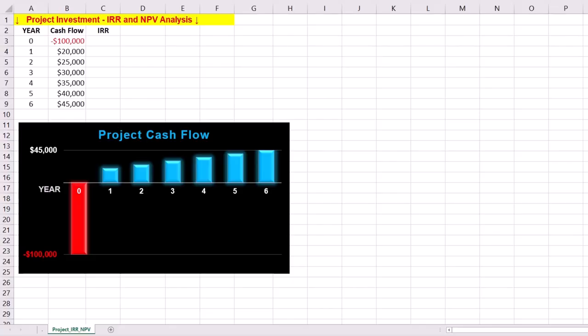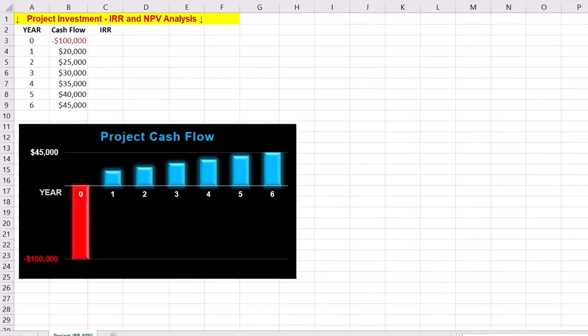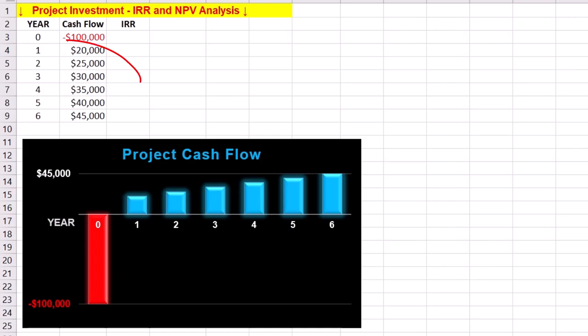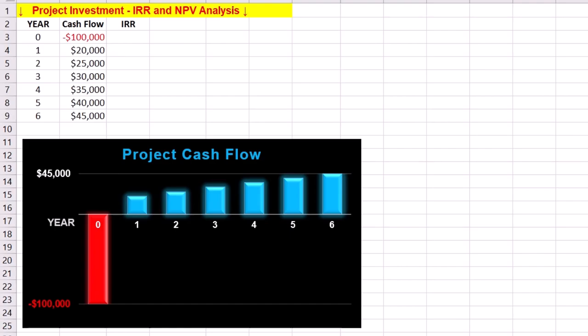Our company is investing in augmented reality to increase the efficiency of its project teams. As the diagram shows, we have an initial investment of $100,000 to buy AR goggles. The projected annual cash inflows over the next six years are also shown. For example, net income for the first year is estimated to be $20,000. We aim to calculate IRR to see if the investment is viable.